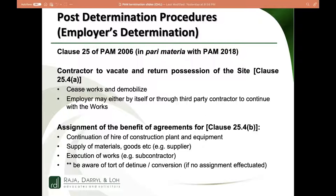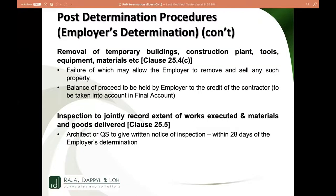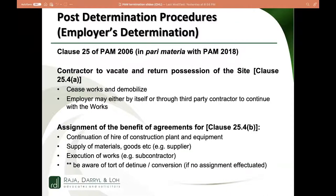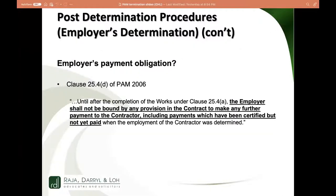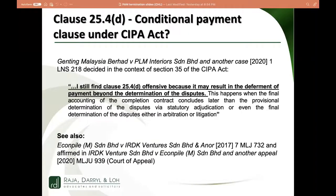In my view there is a difference between determination and termination — subtle it may be, but the use of the word 'determination' is obviously deliberate. The last point I will quickly make is that one of the most debated items in the PAM contract is the fact that once determination happens, it says the employer doesn't need to pay anymore. Cases have held this amounts to conditional payment under the CIPA Act and is therefore void. This issue hasn't gone all the way up yet, but PAM 2018 is trying to remedy that by narrowing the scope — only for amounts not yet certified does the employer not need to pay; whatever has been certified and is due should still be paid.